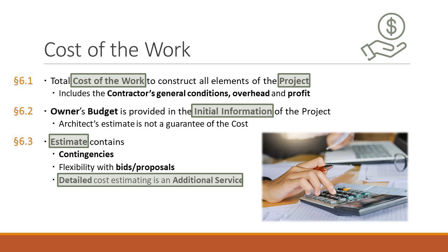Now, how do we fix it? That's coming up in Articles 6.4 and 6.5. But this is, I won't say it's a complete get-out-of-jail-free card, but it is to say, I, as the architect, am not going to give you any guarantee of the pricing. That's not what I do. I design it, I do everything I can, I do the best I can. As long as it's within the standard of care, then we're okay. So when we get to 6.4 and 6.5, I'll explain how we resolved it.